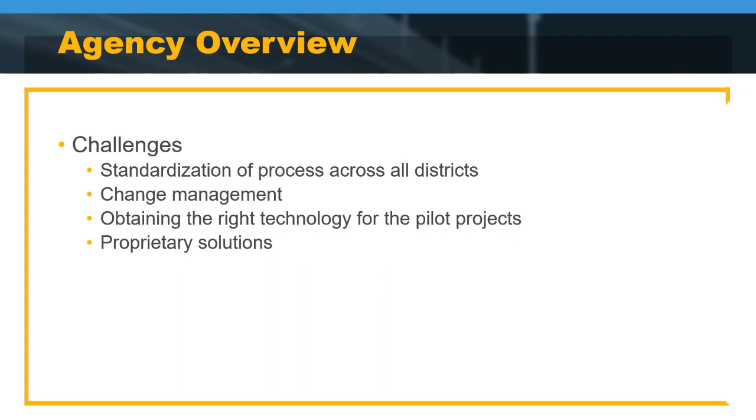Identifying and obtaining the right technology. Just like anybody that works for state government, it takes a long time to procure software. So that has definitely been a challenge initially, even procuring any additional software is taking a large amount of time. And then into that proprietary solution, we will have to figure out the best way to share that information with our contractors. Today we know we can share those LandXML files for the 3D surfaces and break lines, but sharing that whole model with 3D objects will be much more difficult.